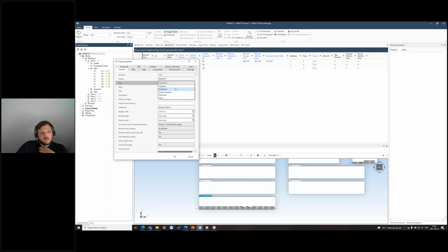So our recommendation is to actually have a pre-phase project, open it in PM, draw your elements. If you are drawing on impact design, fantastic. If you are not drawing on impact design, you can bring them in from Tekla, you can bring them in from Excel. And when you have the elements and you are ready to rough plan them and you've set your erection sequence and so on, then change the type from pre-phase to production. So they start counting as rough and fine plant elements instead of tender elements.